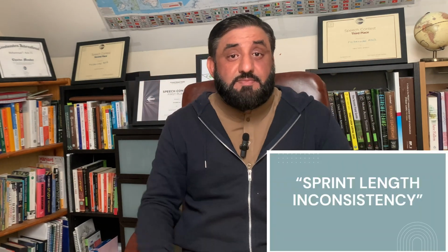Anti-pattern number 7, inconsistent sprint lengths. If you have inconsistent sprint lengths, then you cannot use your velocity to plan for the next sprint. You have no baseline on how much you can deliver within a sprint, and it creates more overhead for everyone. Scrum is based on small iterative cycles, so make them consistent.